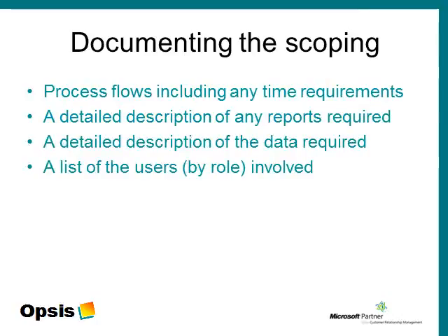The original way of documenting your requirements was a series of documents. First of all, a requirements document produced by you, the client. Secondly, a functional specification, usually produced by a business analyst, who should also have a good knowledge of the product function to be implemented and your business, and who may or may not be part of your organisation. This should be produced in conjunction with you and should be signed off. This is followed by a technical specification, which is then used by the technical team to implement the solution.